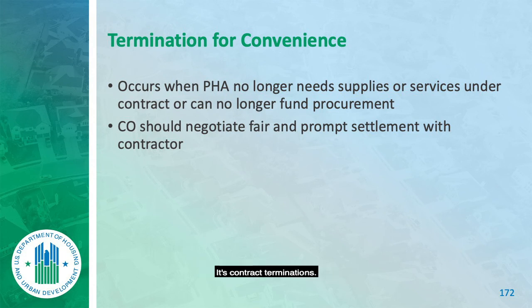It's contract terminations. If you terminate somebody, send a written notice by certified mail. What I do with every certified letter is I take the letter, and I do it because it looks official, and it is official. And they almost always reject the letter. They just won't pick it up or won't receive it. That's fine. I've already sent it to them by email saying I've followed this with a certified letter, and they've already received it because they opened the email. And by the way, in the subject line, I do not say termination. Why? Because they may not open the email, thinking that they can avoid being terminated. Forget it. You are hereby served.